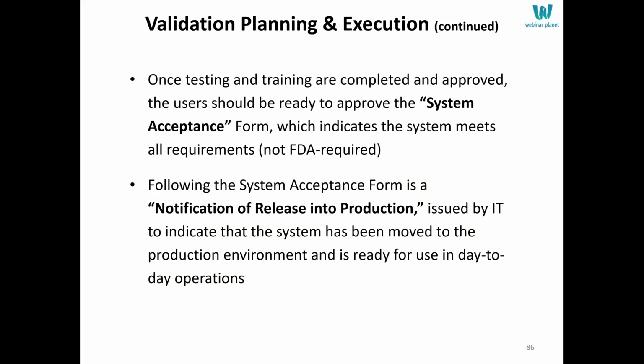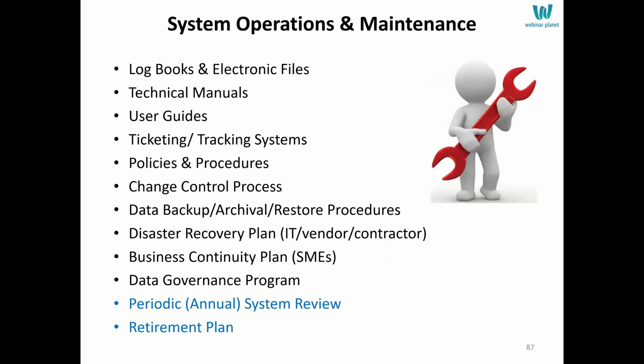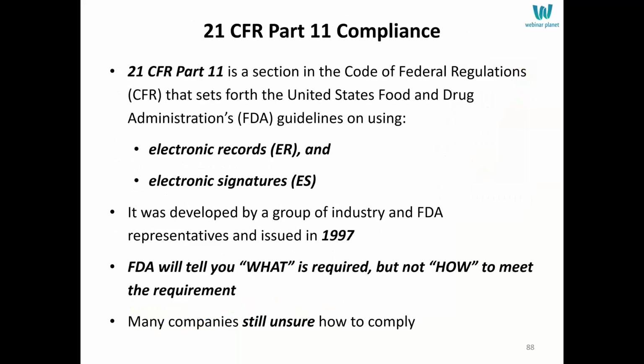When system testing is complete, when training is complete, you can opt to do a system acceptance form, but that's not required by FDA. And then you would notify people that it's in production. Once the system's in production, you must have all of the documentation available and ready to use on day one to maintain it in a validated state. And this is where your technical system steward or your vendor must be able to do these things.